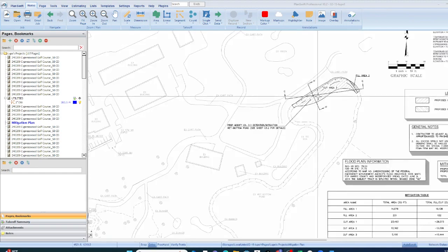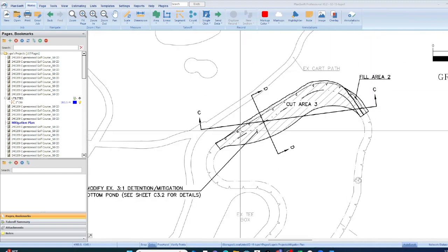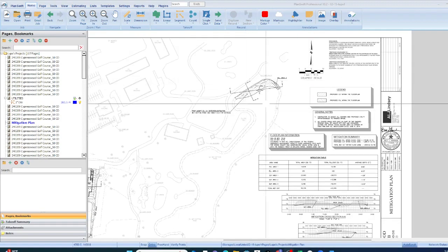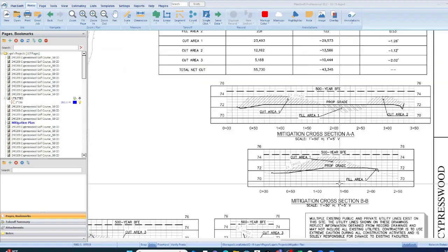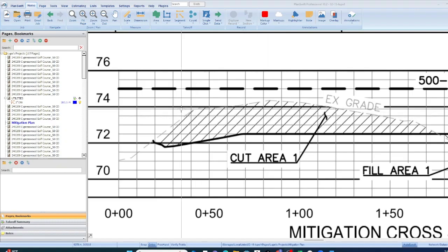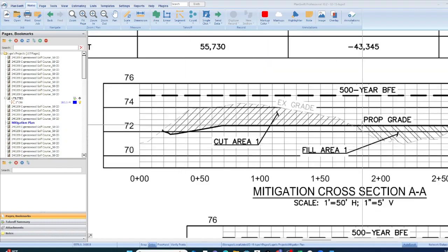Excavation. What this plan does is give us our cut area, and it gives us some section views. You got to know how to look at that. You got to know what that means. So basically what it does is it brings you to something like this that's to scale. It gives you your cut area. What's the proposed grade is always going to be in black. What's existing is always going to be in gray. And so if you use this scale, you'll be able to determine how many cubic yards you need to cut or fill.